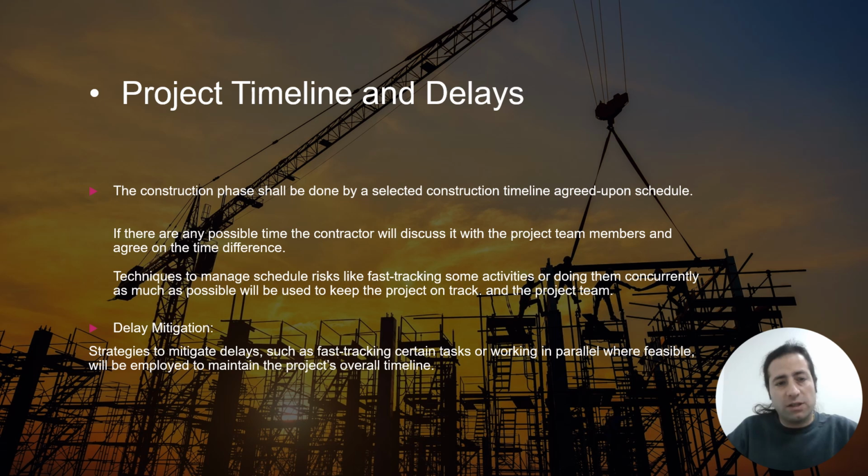Delay mitigation: strategies to mitigate the delay, such as fast tracking certain tasks or working in parallel where feasible, will be employed to maintain the project's overall timeline.